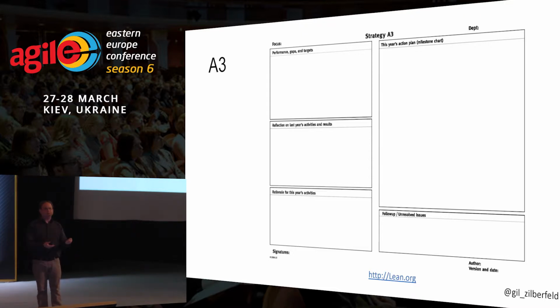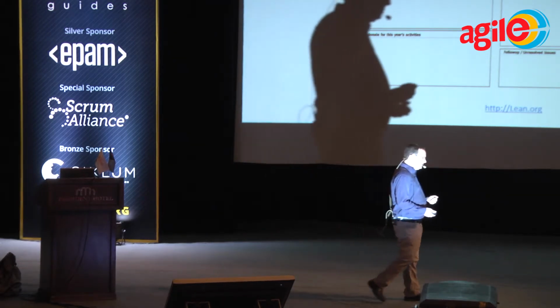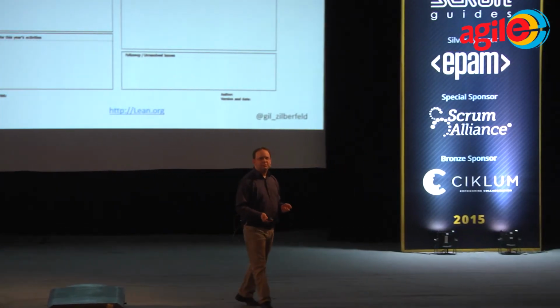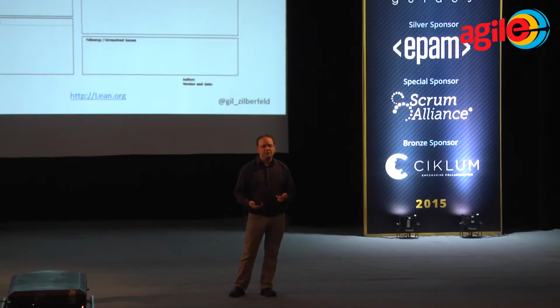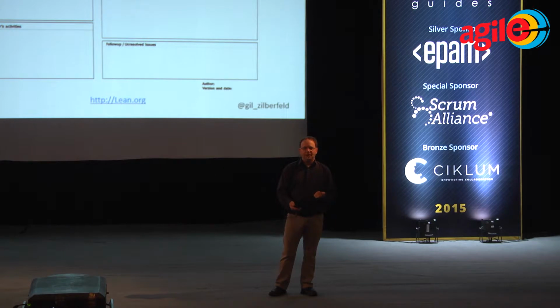Putting constraints on ourselves is something that we've been doing since before the Agile Manifesto. So if you think about iterations, Scrum iterations, for example, an iteration is a concept which is an artificial constraint. But once the constraint is there, we can start thinking about what's important. We start prioritizing what to put in and what we can delay. I actually did